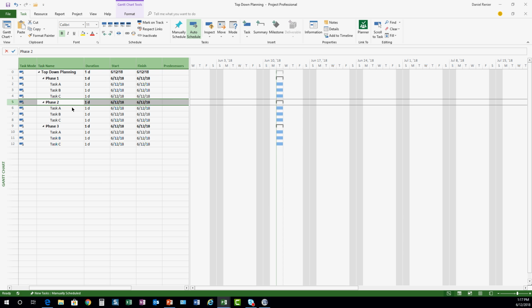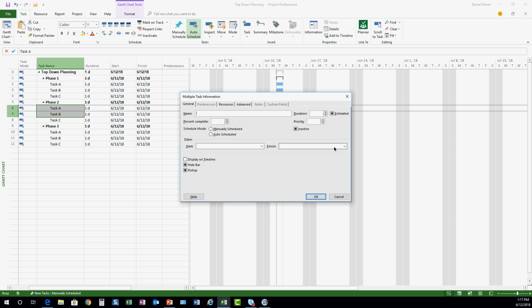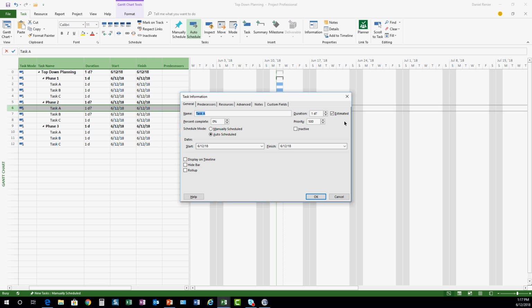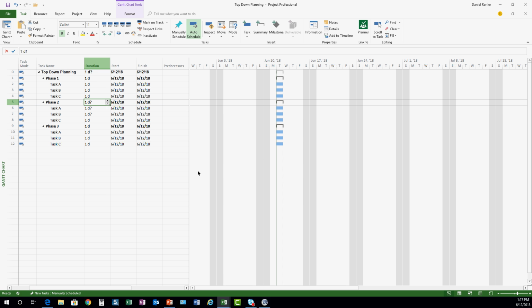To flag the task in that way, that have some unknown flavor to them, to allow that question mark to roll to the summary task itself. So if there are certain tasks in a certain phase during execution where we're having trouble with estimating durations because of changes, then I would change the flag back to estimated. In other words, the flag field, the yes for estimated, so that would flag that entire phase that way.